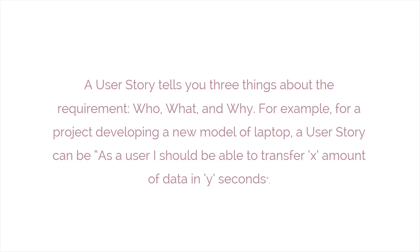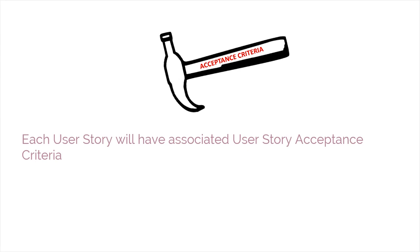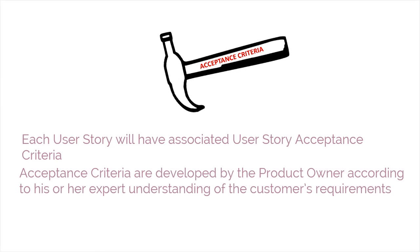A user story tells you three things about the requirement: who, what, and why. For example, for a project developing a new model of laptop, a user story can be: as a user I should be able to transfer X amount of data in Y seconds. User stories are subjective, hence each user story will have associated user story acceptance criteria, which are developed by the product owner according to his or her understanding of the customer's requirements.